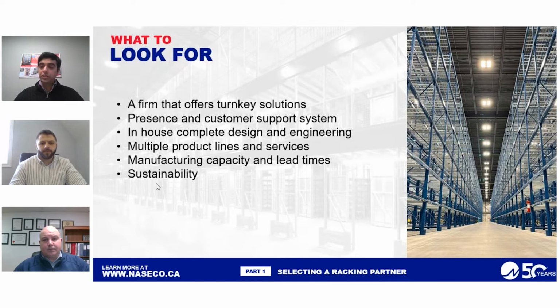Also, the lead times actually get dictated by that. As projects obviously increase, the lead times go higher, but since we have these big manufacturing and distribution centers, we can bring them down and also stock basic components, which can be available in our quick ship inventory program.